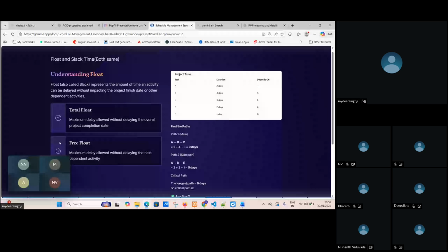Can the development team start on these 2 pages? If yes, we are going to reduce the time. We planned that the UI team would take 2 weeks, and after 2 weeks the development team would start. But we are reducing 1 week from the development team, since they are starting before the original plan. Is this clear?